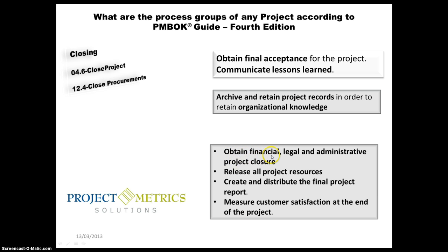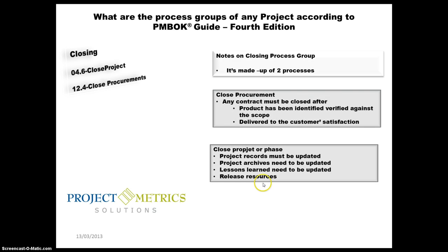You will obtain financial and legal and administrative project closure. You release all the project resources. You create and distribute the final project report. You'll measure the customer satisfaction at the end of the project. That's very close to what I've said in this slide. It's not going to be any difference.